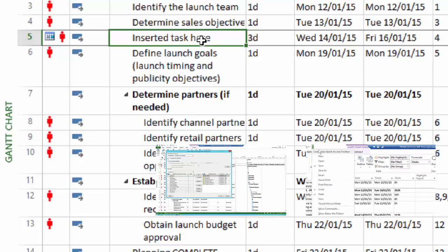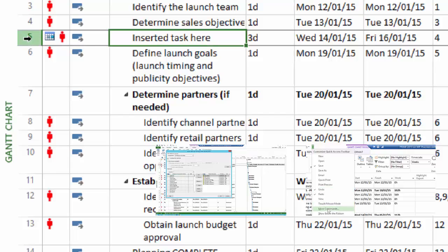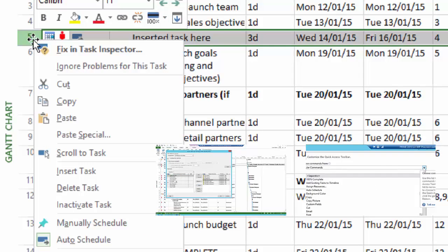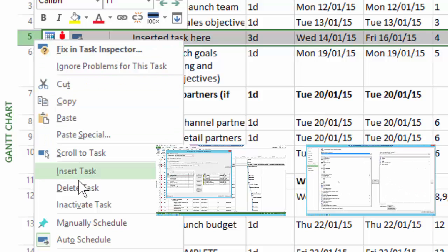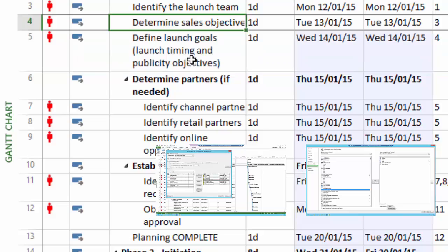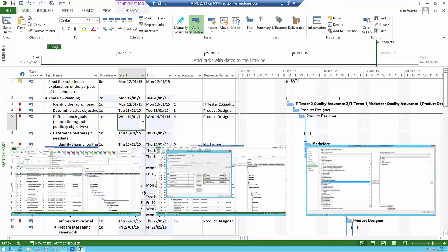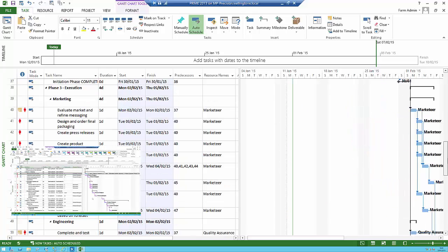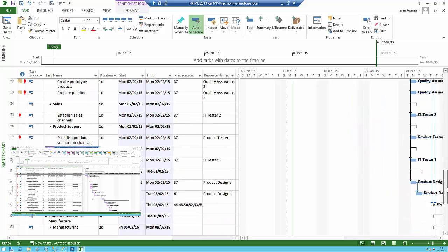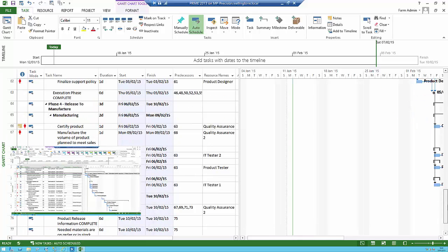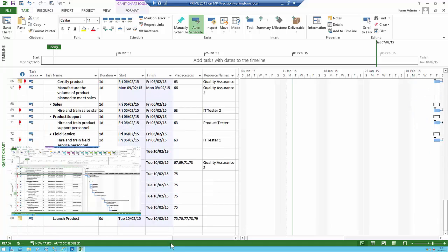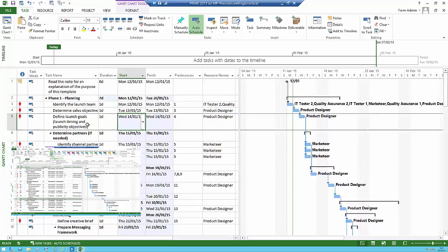You can also delete tasks on the template if they're not appropriate for your project — just right-click on the task and go down and delete it. One thing to point out: when you delete a task, some of the fields are highlighted in blue. That's called change highlighting. It's very useful because you can instantly see the change made to the project duration — whether the end of the project is going to move out or move forward depending on the change you've made.